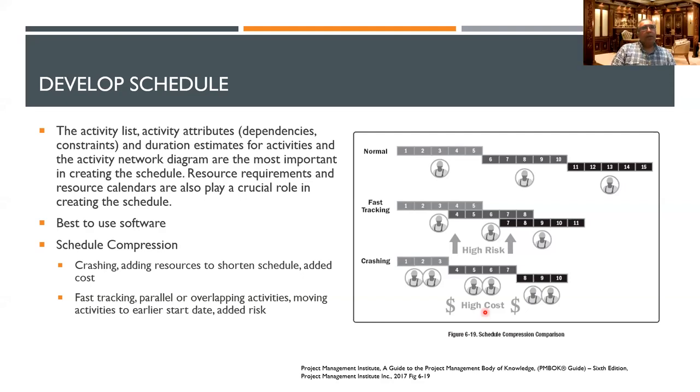Okay, so if there's a labor strike, or like you saw here, there was a bus strike, or natural disasters sometimes. Yes, that is related to one knowledge area, risk management. We will talk about that later on, but in risk management, you will plan. In the planning, we have to make a list of what can go wrong. What is possible? It's possible there could be a strike from the bus. It's possible that our shipment of raw materials is delayed. It's possible our approval from the government is delayed. It's possible people can get sick. The coronavirus, people didn't know about it, now it's a new risk, right? So there's a whole list of things that can go wrong, which can delay your project.